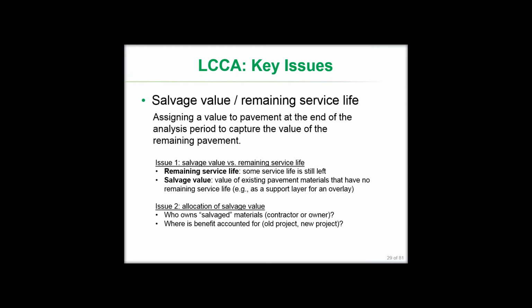And then allocation of salvage value. This issue is basically, well, who owns the salvaged materials? So if it's the materials, is it the contractor or the owner? Oftentimes in contractual relationships, the contractor ends up owning the materials once they transport them and haul them away from the site, but sometimes it is the owner.